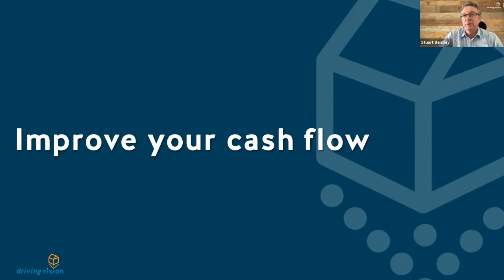Client cash flow refers to the analysis of when costs are incurred and how much they will amount to during a project's lifespan. The ability to predict cash flow is vital so that the right level of funding and drawdown facilities are in place. While contractor cash flow is the money coming in to pay suppliers and subcontractors, if payment is delayed along the supply chain, it can have a negative impact on the project.